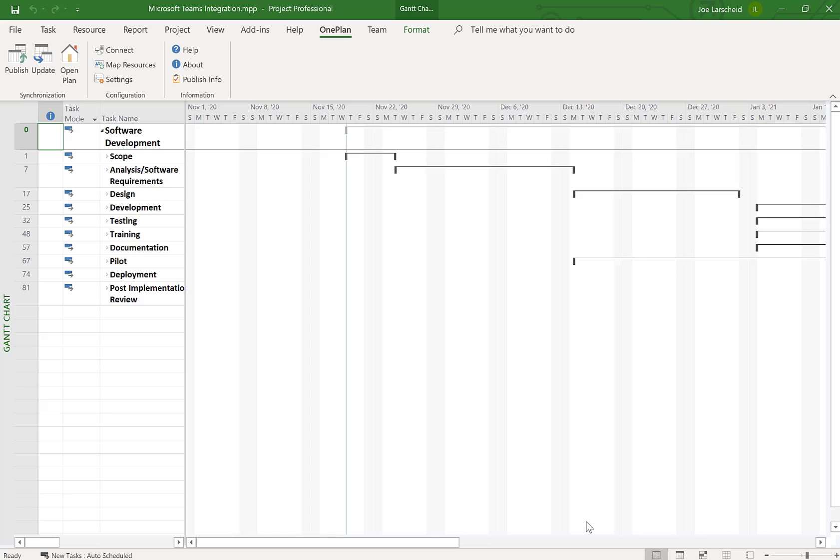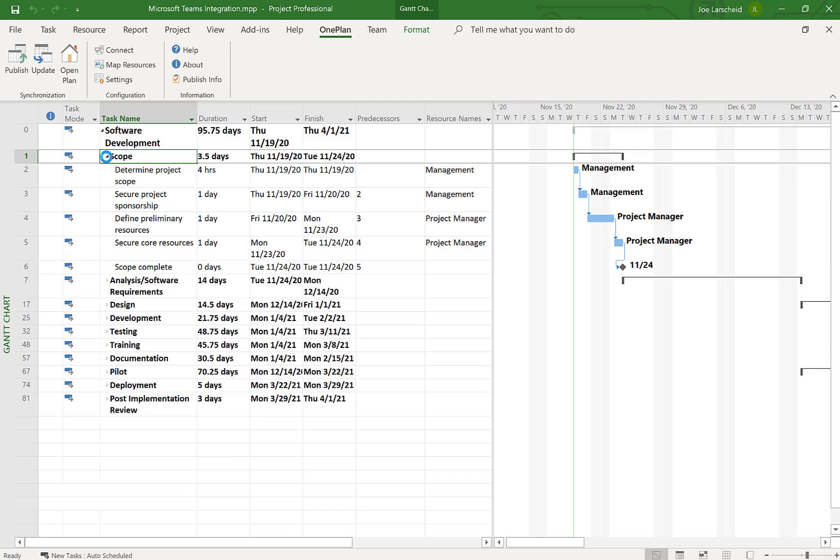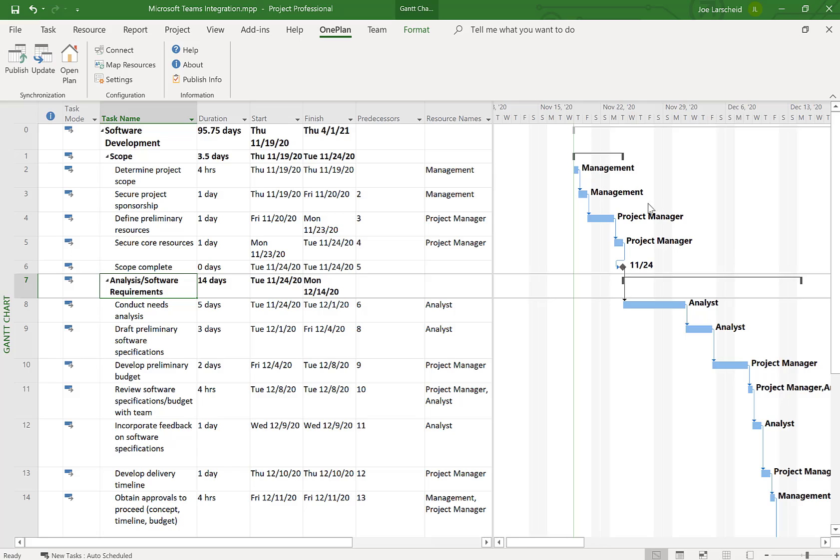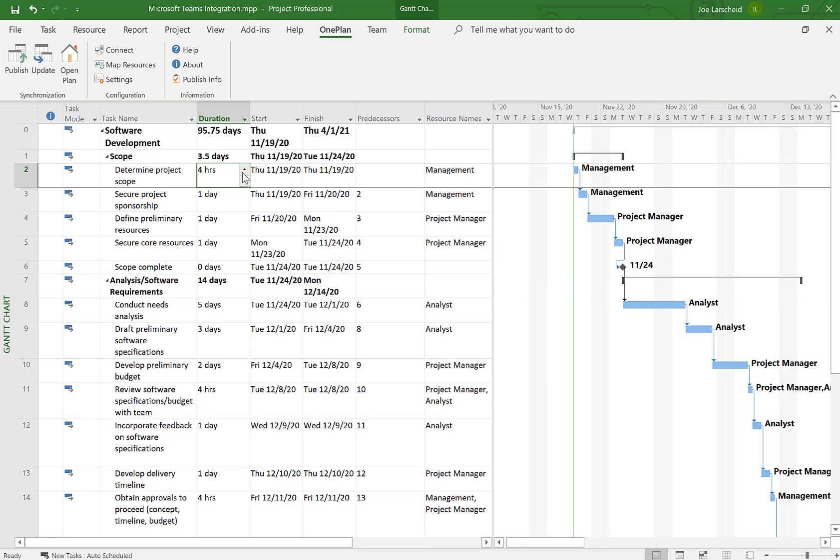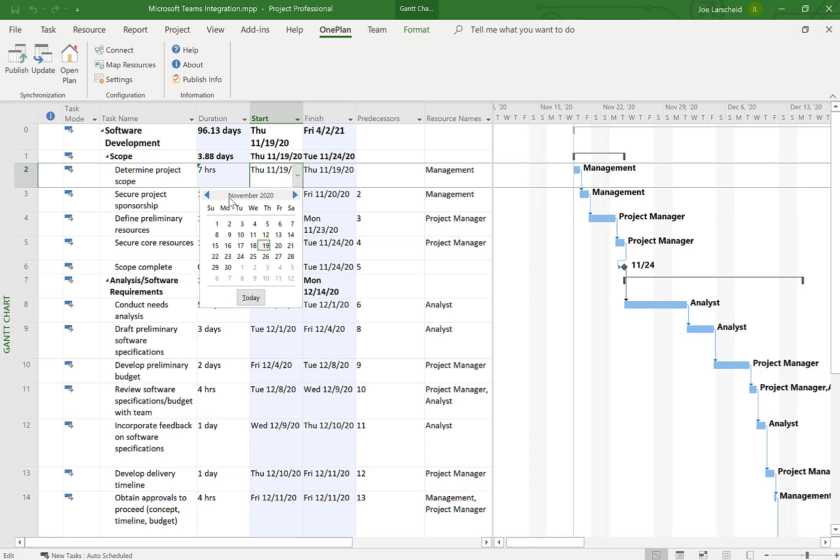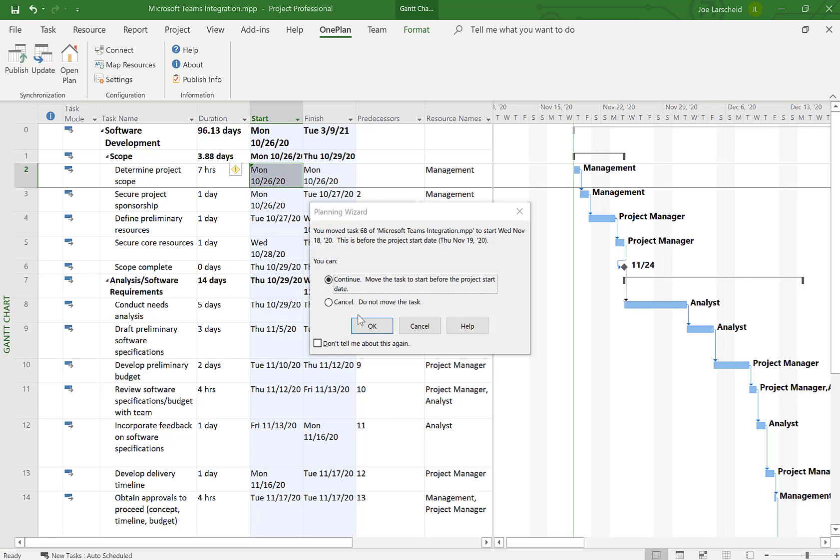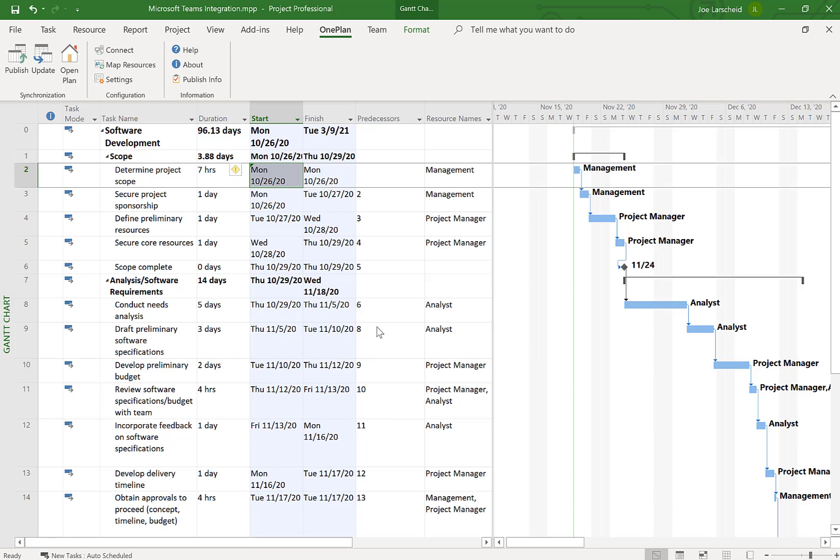So now you'll see here it's created a Microsoft Teams integration project and it's used a template. So I can quickly make some adjustments to this template if I like. You'll also notice in here we have some generic resources that are assigned to this. So the next step here for me is I can make adjustments, change things around. So this is going to start, make some changes.